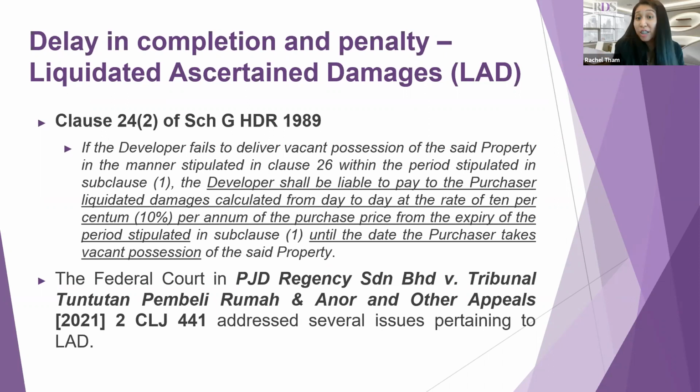the property. On the 19th of January, the Federal Court delivered a landmark ruling in the law of housing development in the country. The decision was delivered in PJD Regency Sdn Bhd and Tribunal Tuntutan Pembeli Rumah and other appeals. The essence of this case is whether the date for calculation of liquidated ascertained damages begins from the date of payment of deposit or booking fee or initial fee or his written intention of purchase, or from the date of the sale and purchase agreement.